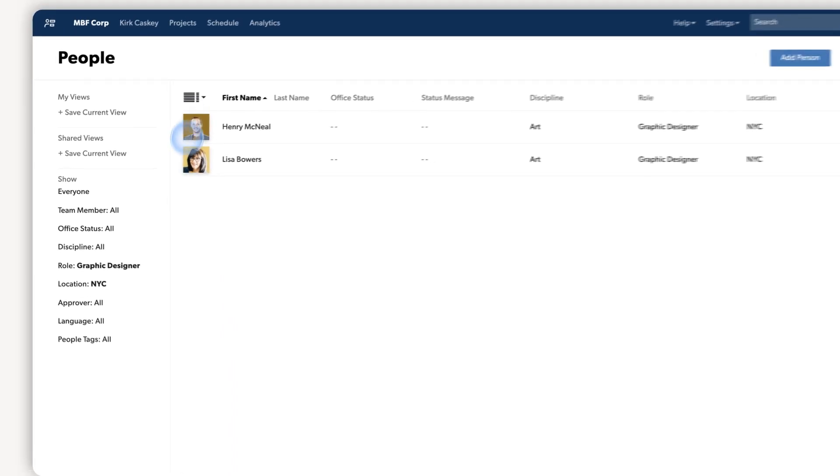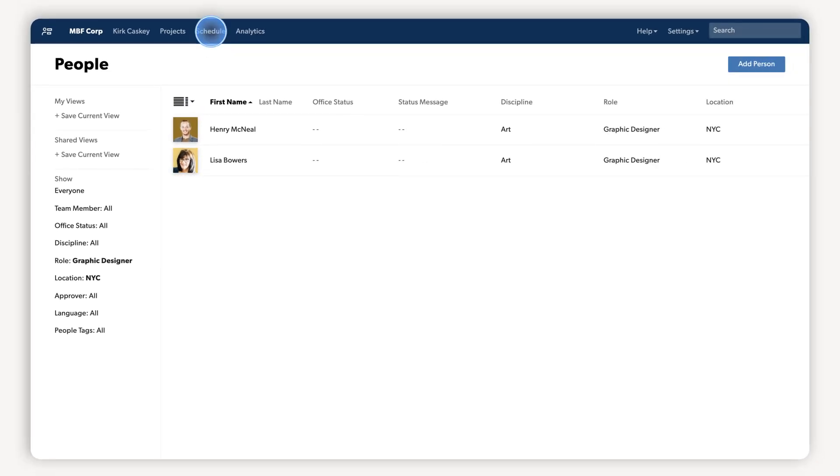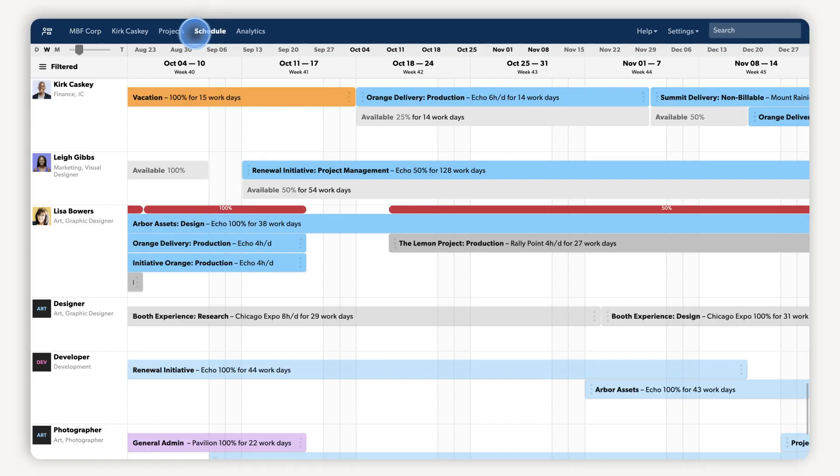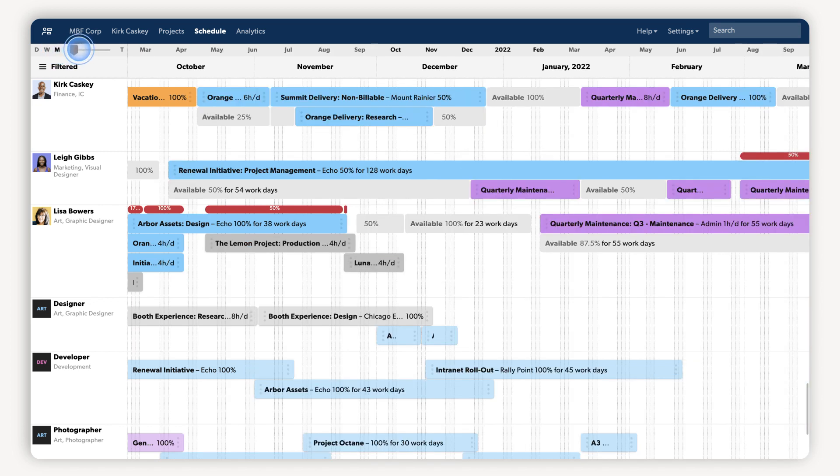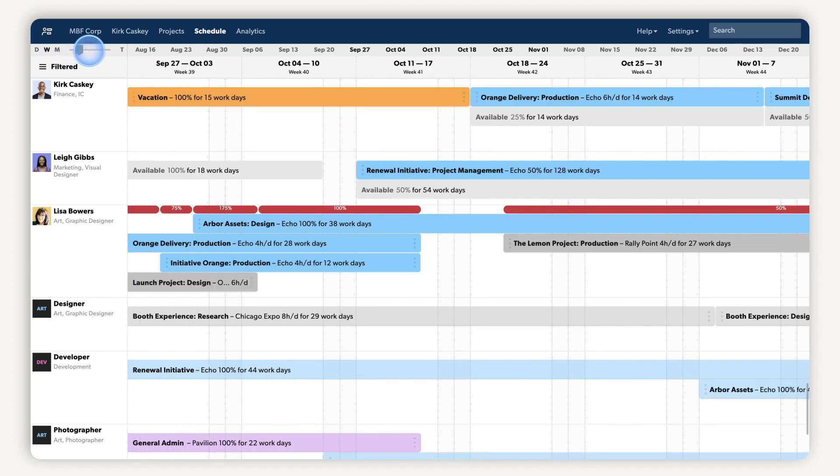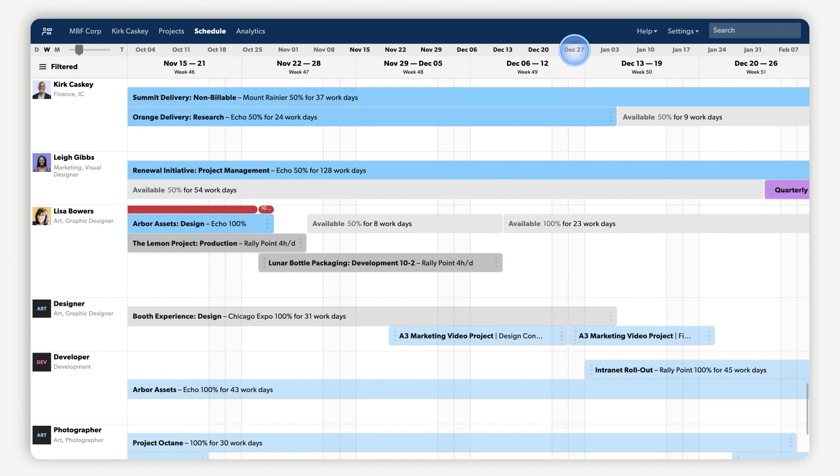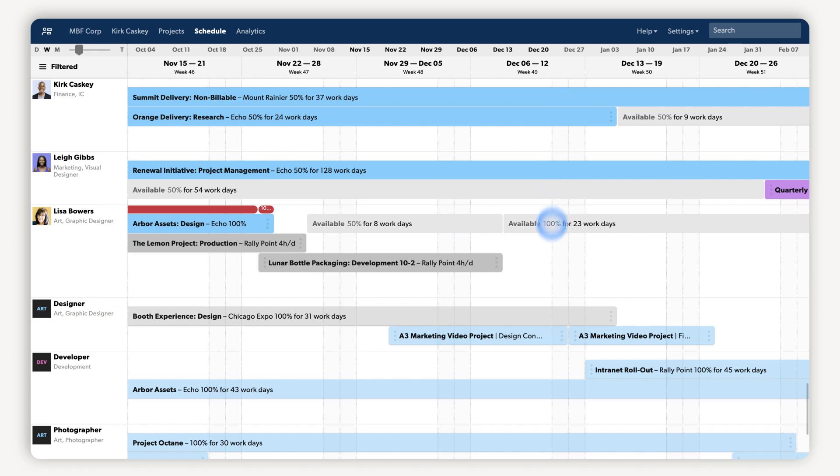Now let's hop over to the people schedule to see who's available, what everyone's working on, and spot who's unable to start your project immediately due to time off. It looks like Lisa is available and meets the criteria for this project. Let's assign her the work.